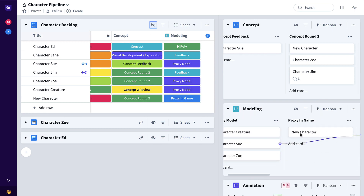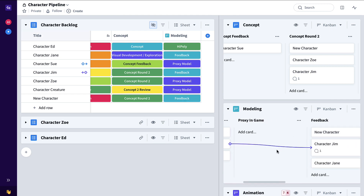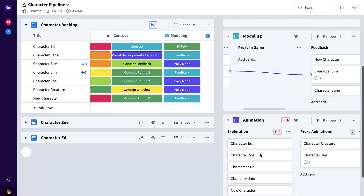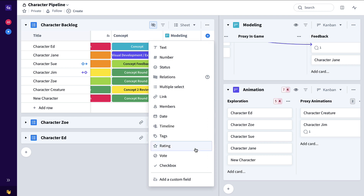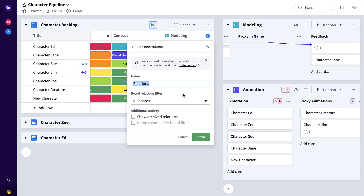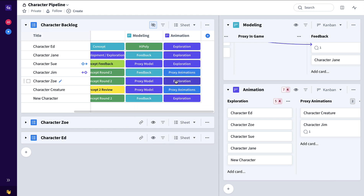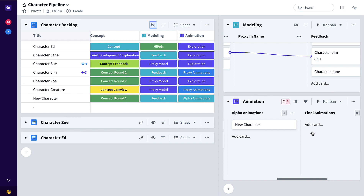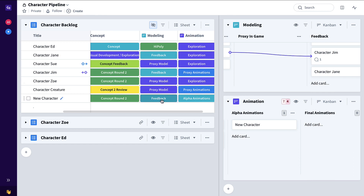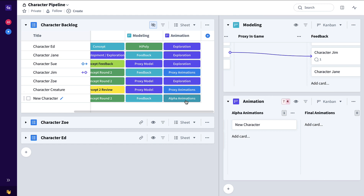As this character continues to progress through modeling proxy and game feedback, that same character is now ready to be worked on by the animation team, where they can start their simultaneous animation pipeline flow. So let's add the relations column to highlight the animation pipeline status. Now as this character progresses through proxy animations, alpha animations, and so on, back here in the backlog we're able to track for all of the characters the concept status, the modeling status, and also the animation status. So there you have it — four good practical examples of how to use the Favreo Relations column, as well as the general overview. Thanks and good luck with Favreo.